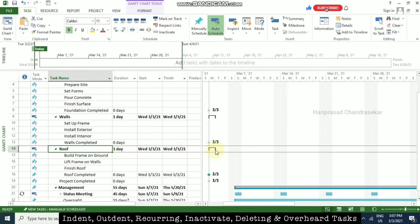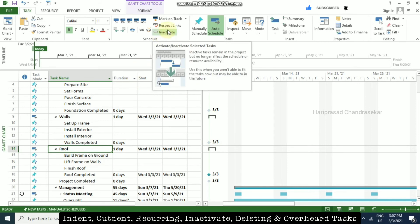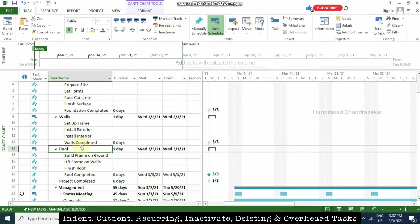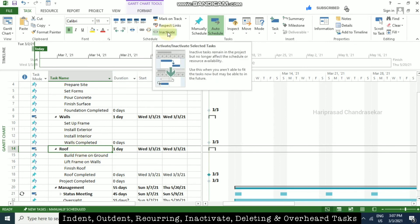If you want to make a task active again, just click the Inactive button again and it will be active — you will see it back in the Gantt chart. This is how you inactivate or activate a task using the same button. It is similar to deleting, but if you delete a task you cannot get it back, whereas with inactive you can reactivate it later.